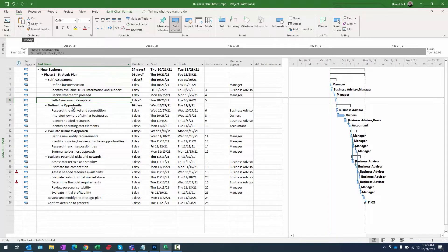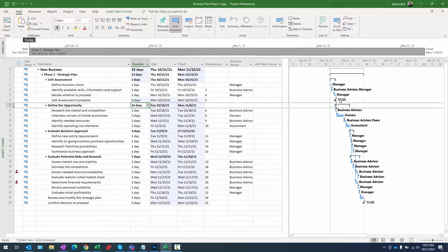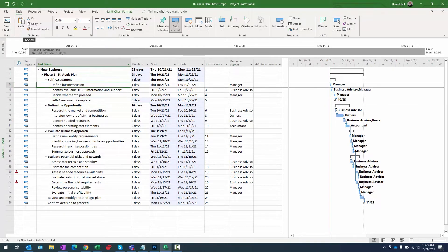There are a couple of ways to make this a milestone. You can go into the advanced settings of the task, or you can simply type zero in the duration column. Let's try that method — type zero, press enter. You'll notice we now have a diamond in the Gantt chart denoting this is a milestone. Hovering over it shows a finish-to-start relationship with zero lag.